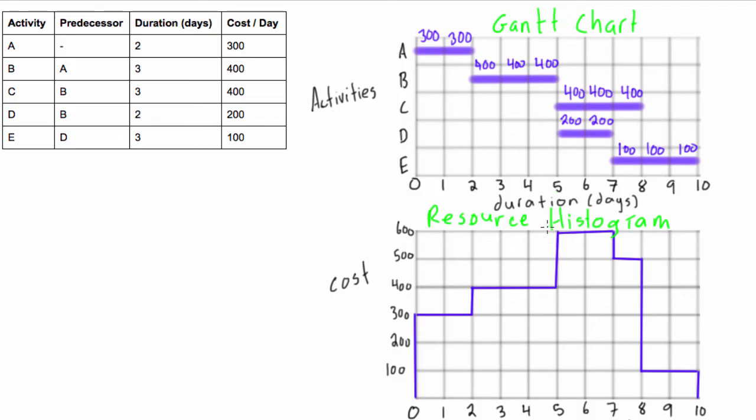So there we go, Gantt chart, resource histogram. You can show someone either of these. Maybe if you wanted to show someone, hey look, this is our cost per day. Pretty simple, people can see, okay yeah, this day is going to cost more than maybe this day down here.